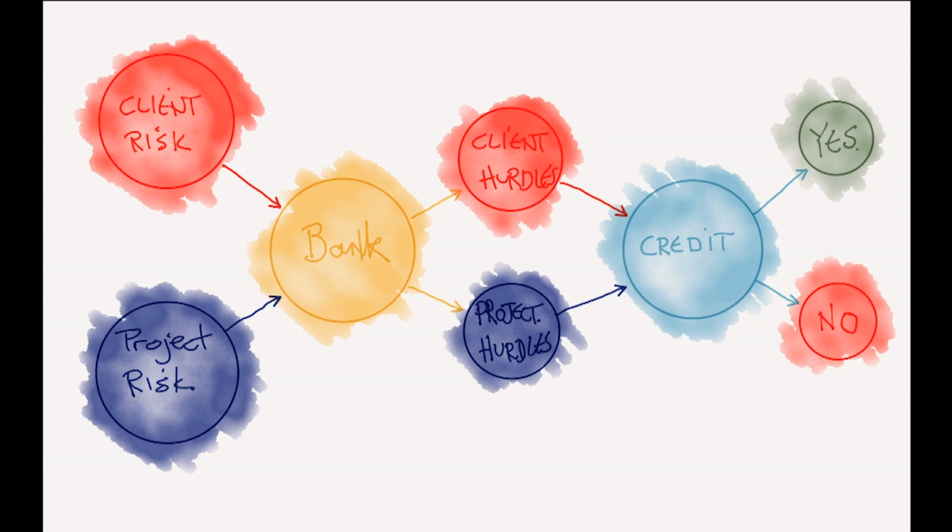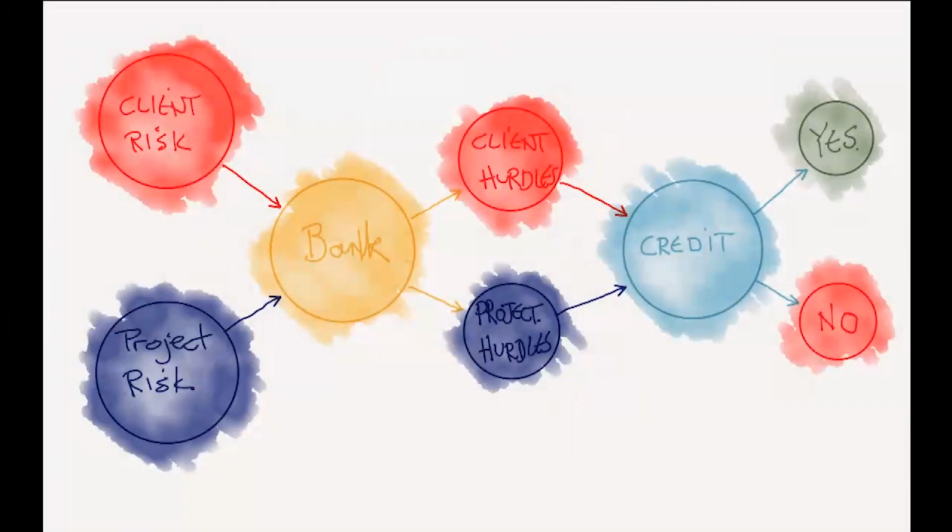So you'd have to be, say, in retail, maybe 80% let by area or by value. The client needs to show that they have experience in this field and that they have the correct backing behind them and experience. And those two things, the client hurdle and the project hurdles, are then sent up to credit. And credit assesses it as an impartial body. And it either says, yes, they're going to allow for their funding, or no, they're not going to fund that scheme. And if it's yes, there are going to be certain conditions precedent around which they will release that money.